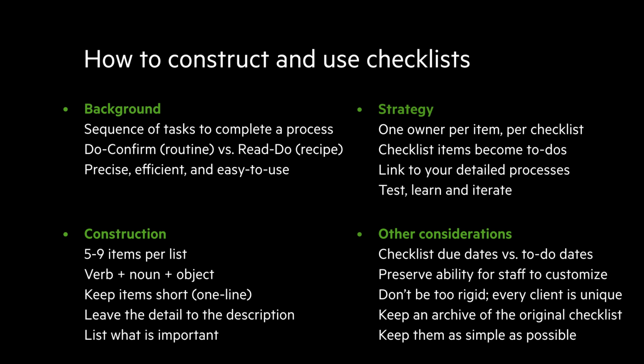And so that's why the experts out there will tell you 5 to 9. If you go really, in my opinion, down below 6 or so, then really it's just a bunch of to-dos, and really is it constructed as a process? And maybe you probably haven't made your stuff granular enough. So, I view the sweet spot to really be 7 to 9.